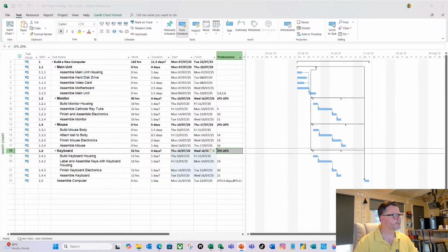So once you've done that, I think for me, and I am old school, I believe that you should always have a milestone in your plan, or milestones. And those milestones should represent your product breakdown structure, i.e. the deliverables or the sub-deliverables within your product breakdown structure, or a key decision point within your project as well. I believe a group of activities should end in a milestone. So how do we get milestones into our project plan?